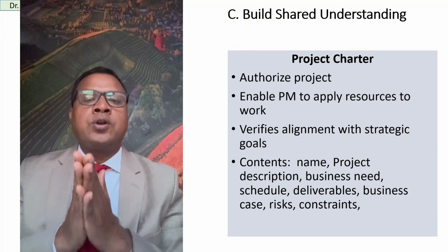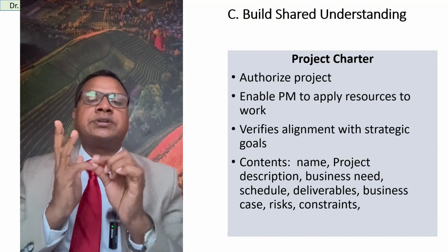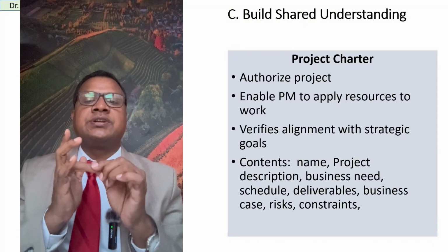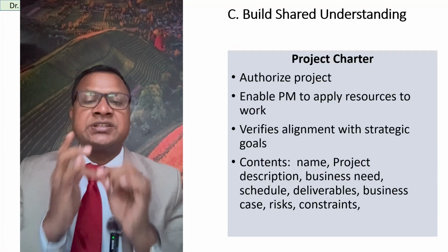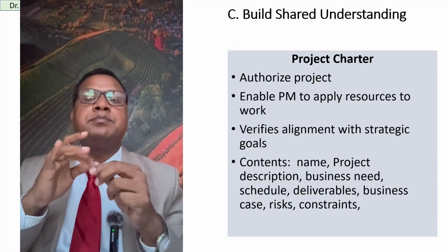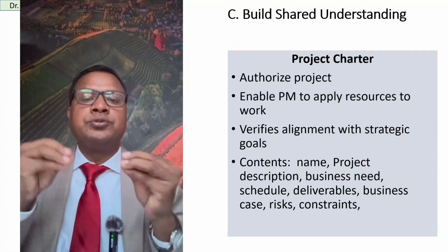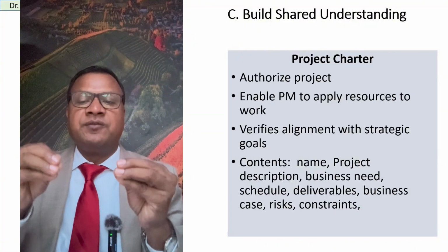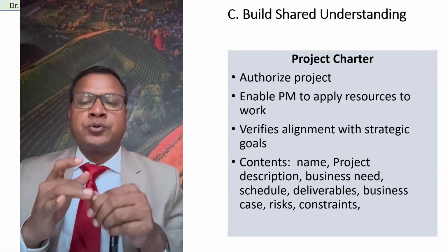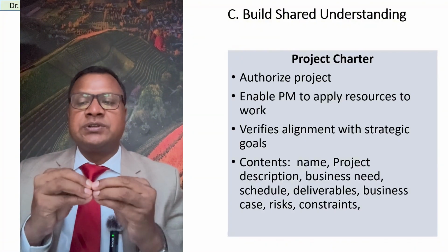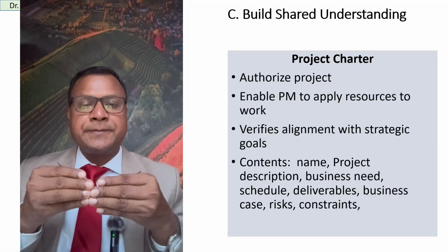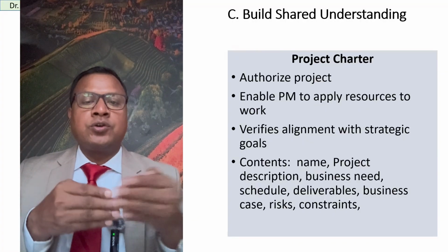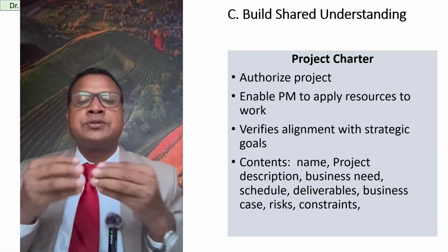So what are the contents of this project charter? The project charter has a name. There will be a project description in the project charter. Business need, why we should do this project, what will be the benefit, and the schedule of the project, the deliverables of the project, the business case, cost and benefit analysis should be there.